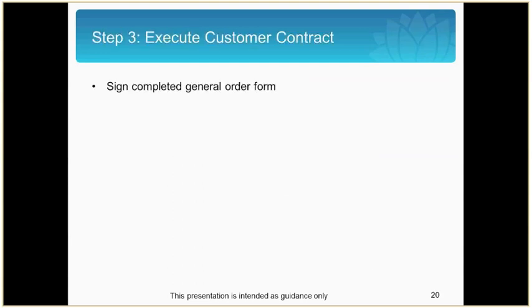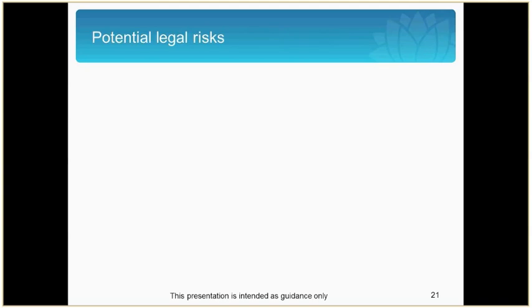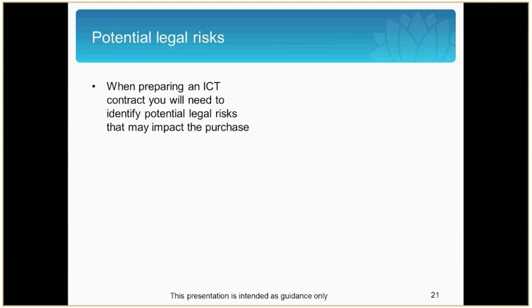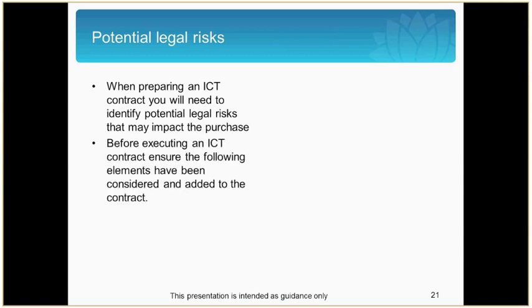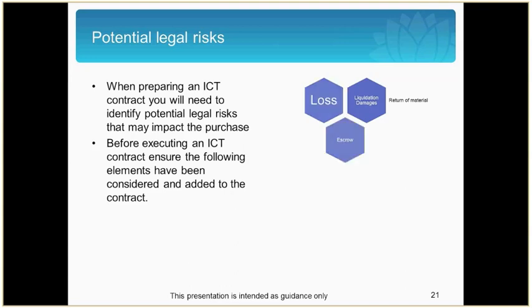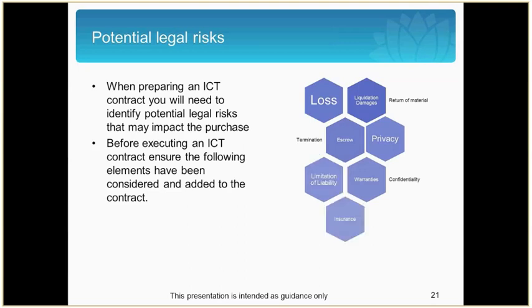The third step is to execute the customer contract. Both parties will need to sign the completed general order form. But before you do this, you need to make sure that you have considered all potential legal risks and that they have been evaluated and added to the contract. These risks include liquidated damages, return of material, loss in escrow, termination, privacy and warranties, confidentiality, limitation of liability and insurance, variations, intellectual property and securities, and indemnities.